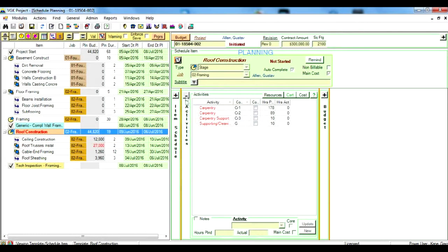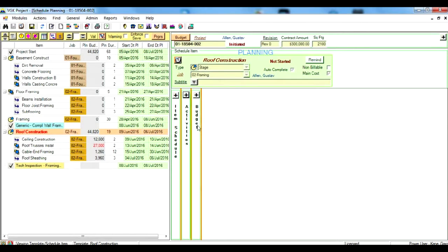As you can see, there can be several activities specified within each item. And when we import a schedule block, the activities that are part of that block are also imported into the schedule. Note that the activities come with their planned man-hours set, which you would already have specified when creating your template. In fact, every item can have several components, like materials, activities, equipment, as part of a template, which can then be easily imported into your schedule.